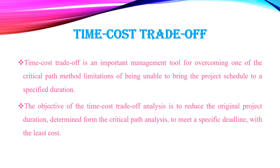The objective of time-cost trade-off analysis is to reduce the original project duration determined from the critical path analysis to meet a specific deadline with least cost. Time-cost trade-off is introduced as a new tool for overcoming the limitation of critical path in scheduling, and its main objective is to reduce the project duration.